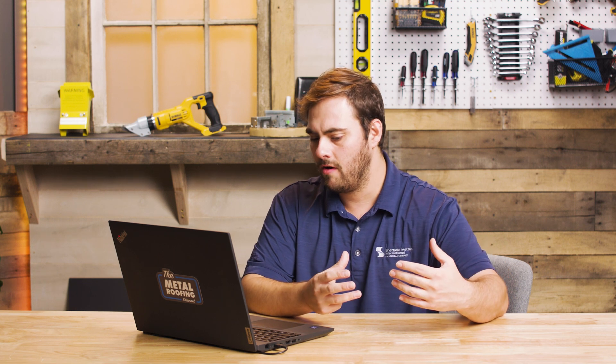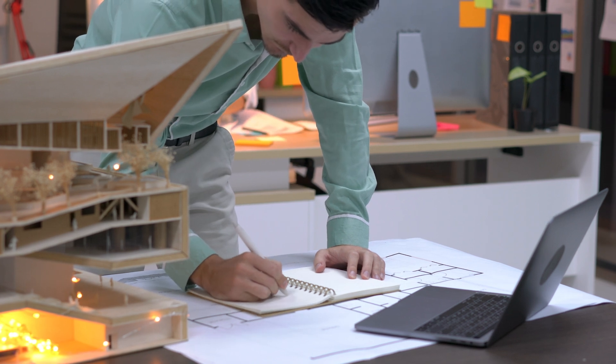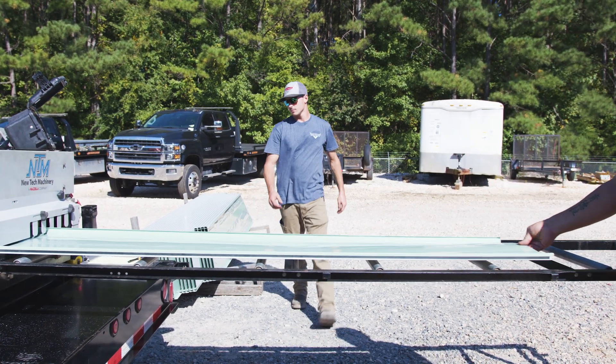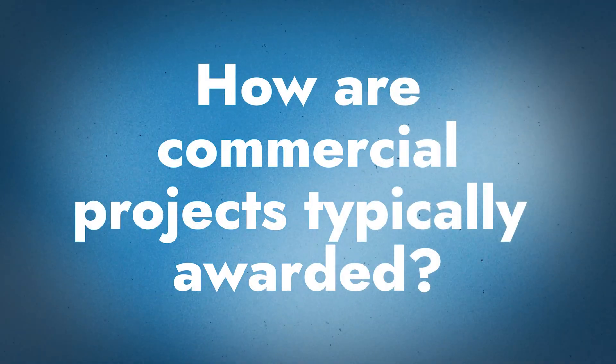Let's start with the roles in the commercial building process — who are the different people and companies involved. On a commercial project, let's start with the architect, who is going to either be in the process of designing or have already designed and specified everything. That project will be awarded to a general contractor, who manages all the different facets. From Sheffield Metals' standpoint, we're concerned with the general contractor but also the commercial roofing company trying to win that project.